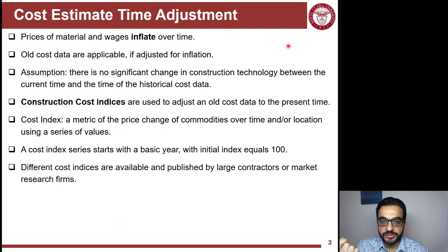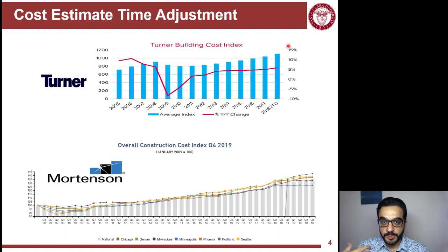There is no single correct cost index that's published. You can get it from different sources. Some big companies like Turner, Mortensen, I'm sure other big companies, they track their own costs very well, and they can actually produce cost indices for their own uses.